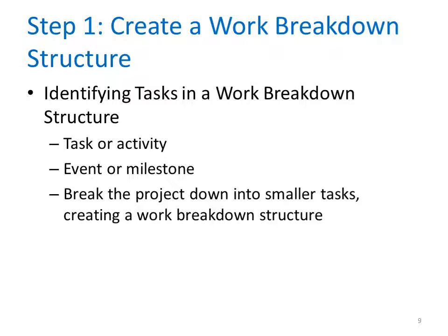In addition to tasks, every project has events or milestones. An event or a milestone is a recognizable reference point that you can use to monitor progress. For example, an event might be the start of user training, the conversion of system data, or the completion of the interviews. A milestone such as "complete 50% of the program testing" would not be useful information unless you could determine exactly when that event will occur.